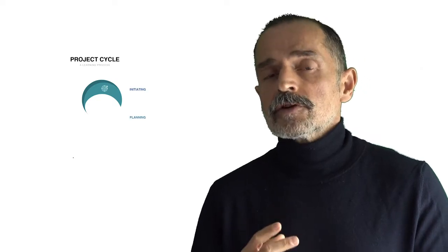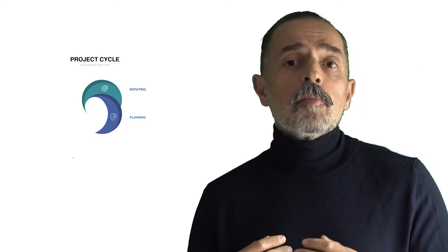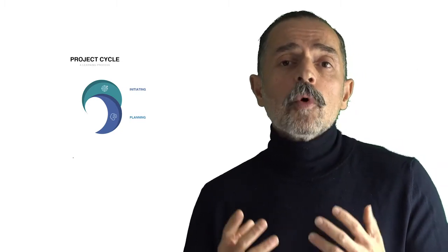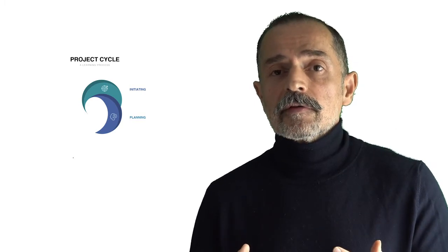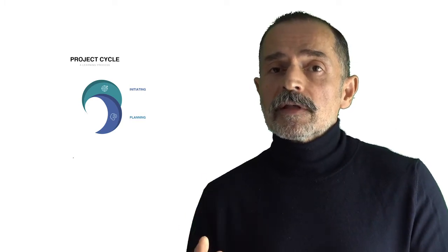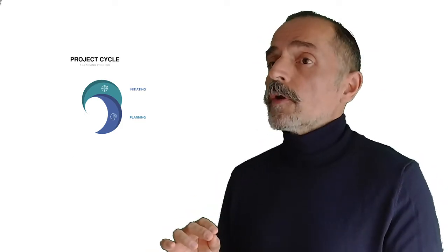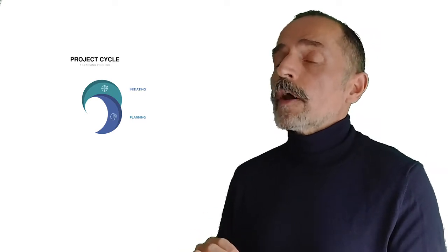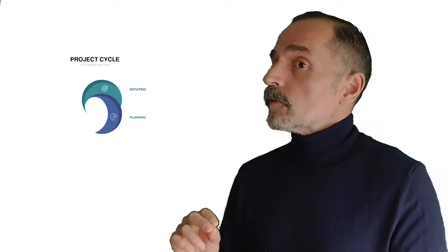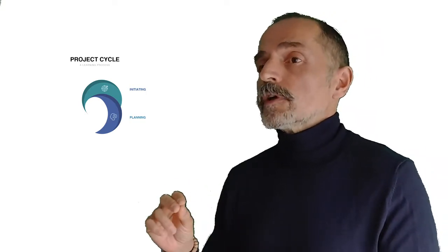During the next stage, you will do the planning of your project. You will plan the activities, and once you have the activities, you can start the budgeting exercise. You are putting a price tag and a time span into your project. Don't forget that you can only start the budgeting exercise once you have defined all your activities, and don't forget that you define production as well as support activities.